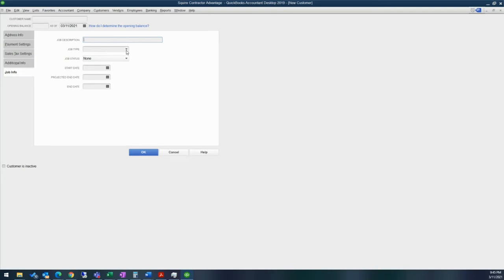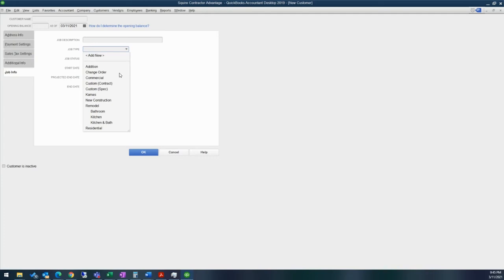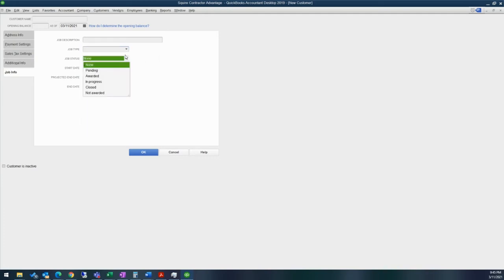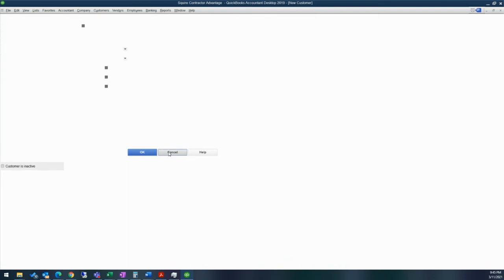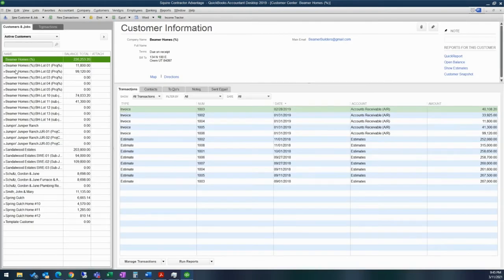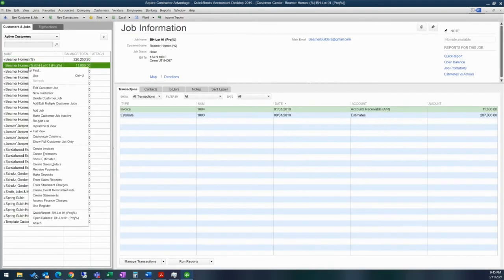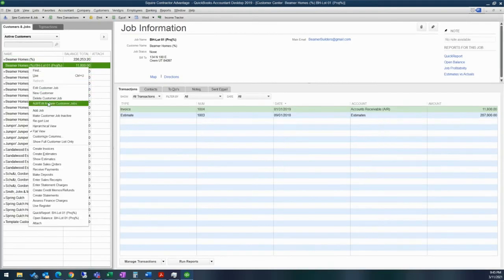And then job information, is there a specific job type that you're doing such as if you want to check change orders, if you want to look at commercial versus residential, you can add in those type of details here. You can choose a job status. Unfortunately, these can't be altered. It's either one of these statuses if you decide to do that. You can add a start date, projected end date, as well as a finalized end date.